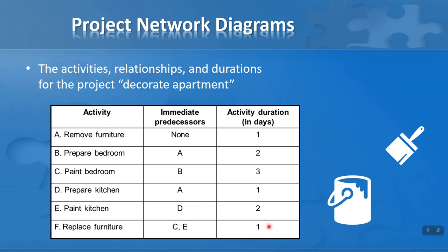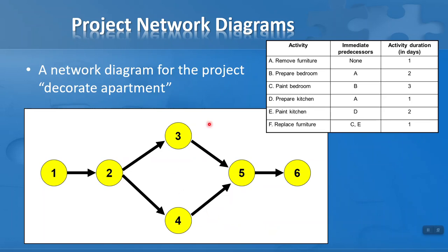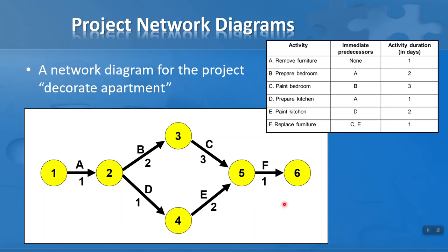Now let's plot this on a project network diagram. The network diagram for the decorate apartment project has six activities represented by six arrows. Using the immediate predecessors, I can see one path: activity A, followed by B, followed by C, followed by F. Another path is activity A, followed by D, followed by E, followed by F. I add in the activity names and durations: remove furniture is one day, prepare bedroom two days, paint bedroom three days, and so on.